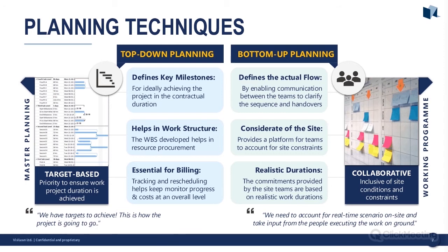Then we move to the bottom-up approach, which is much more collaborative. So this defines the actual flow. So people on site, the teams, the packages, the subcontractors, all communicate and collaborate. And then you can break down those key milestones into the actual flow of activities and the sequence of works that are actually going to happen.